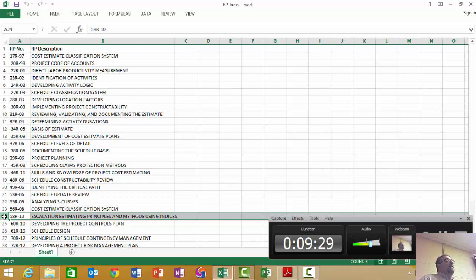And more than likely, his quote will say, here's your price for ready-mix concrete, and it's valid until June 30, 2015. After June 30, 2015, add $1.25 per cubic yard. After January 1, 2016, add $2.50 per cubic yard. That's escalation.